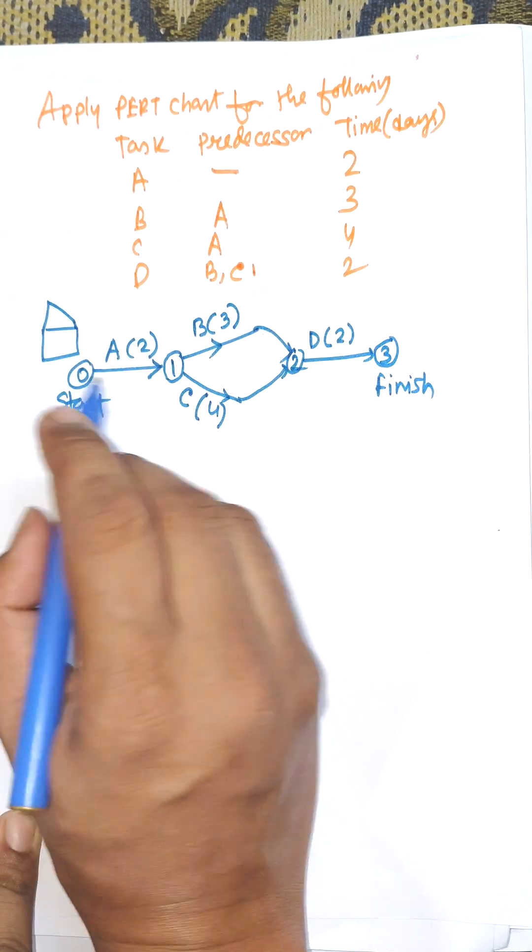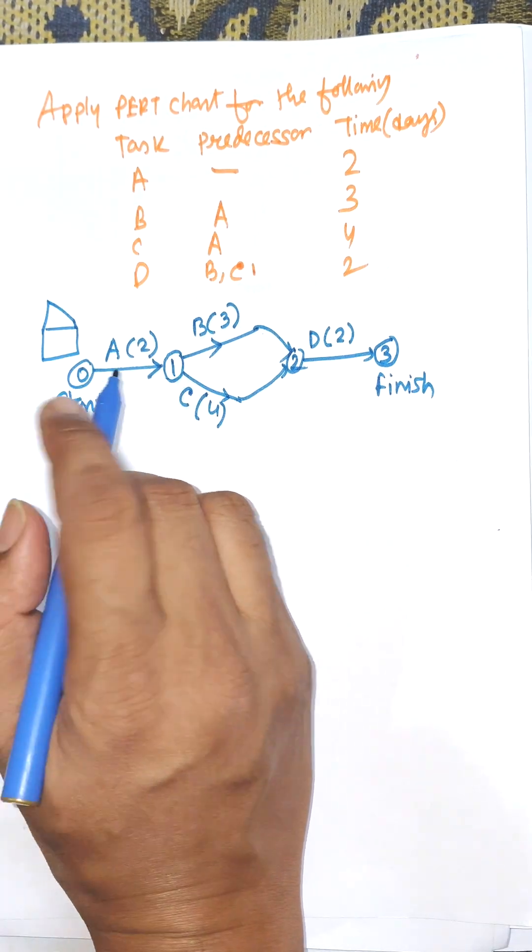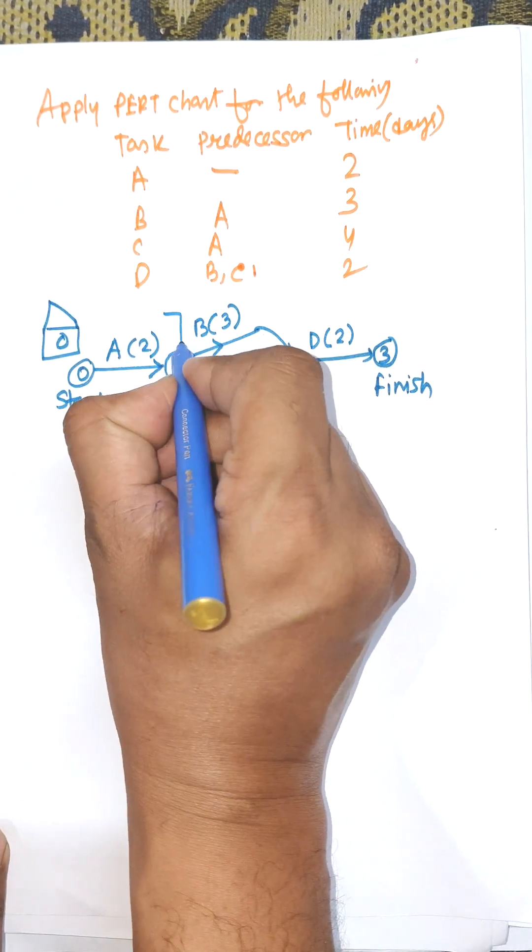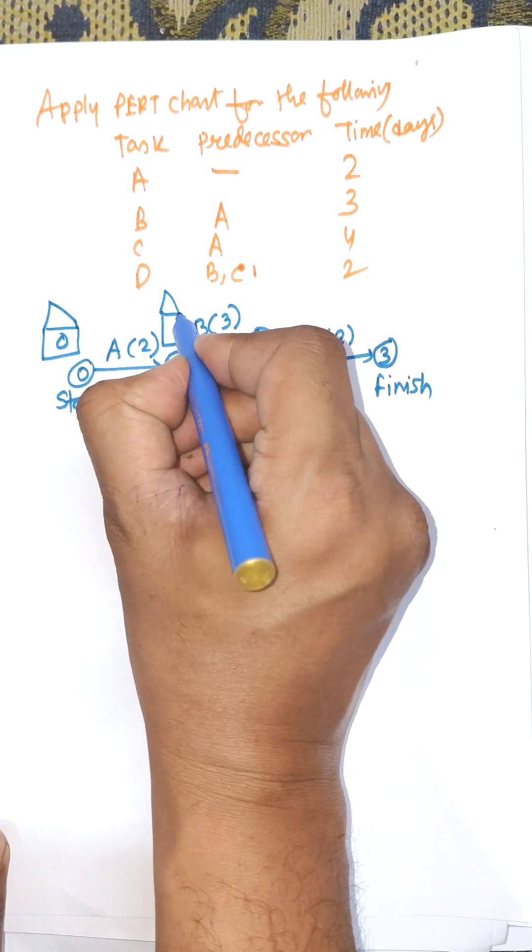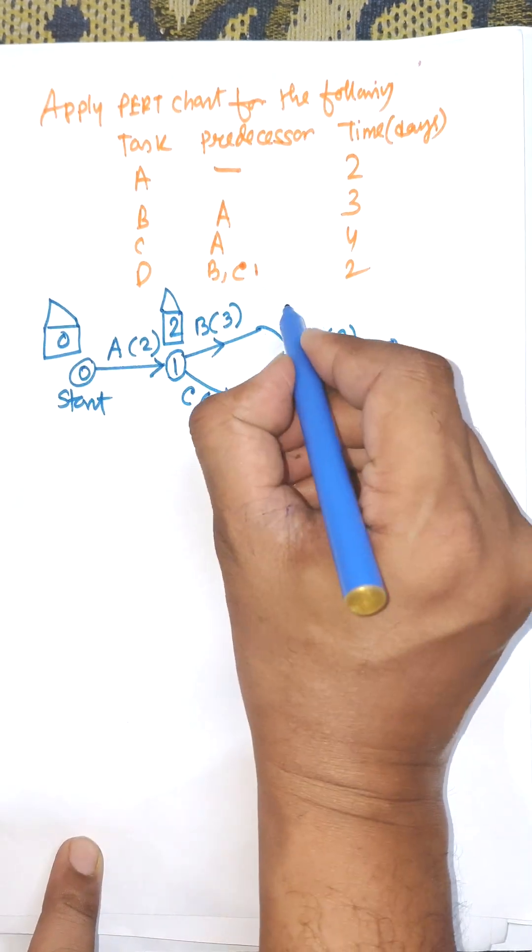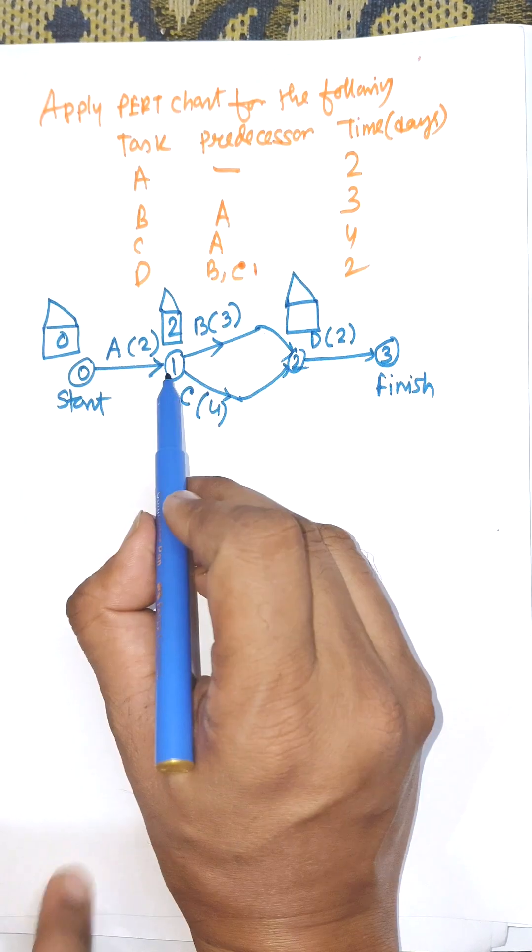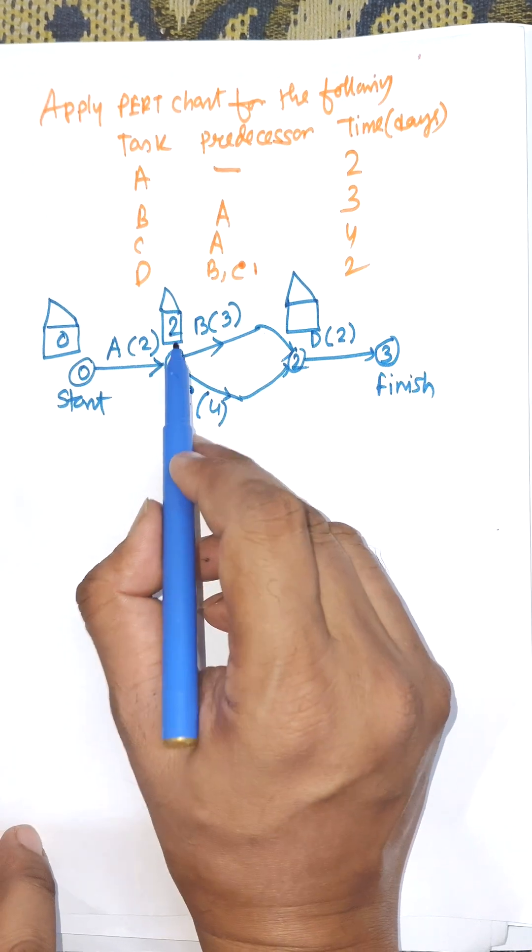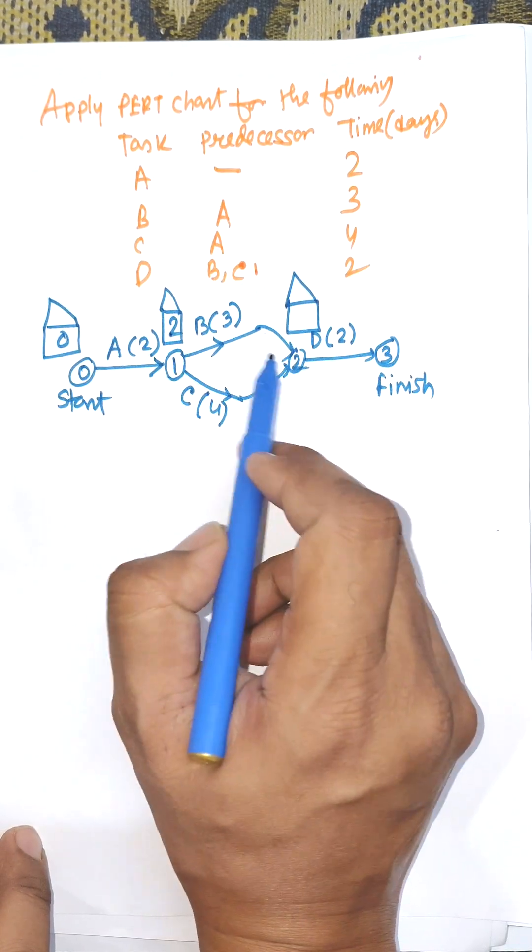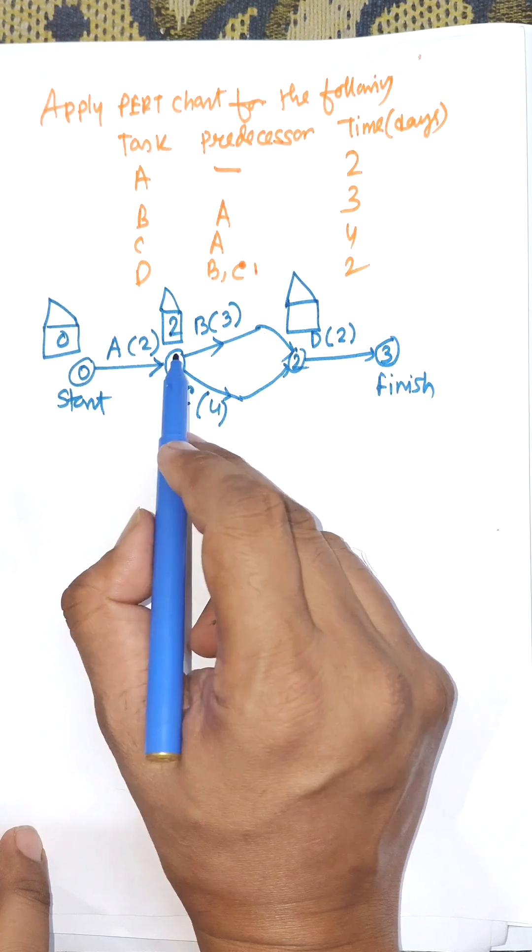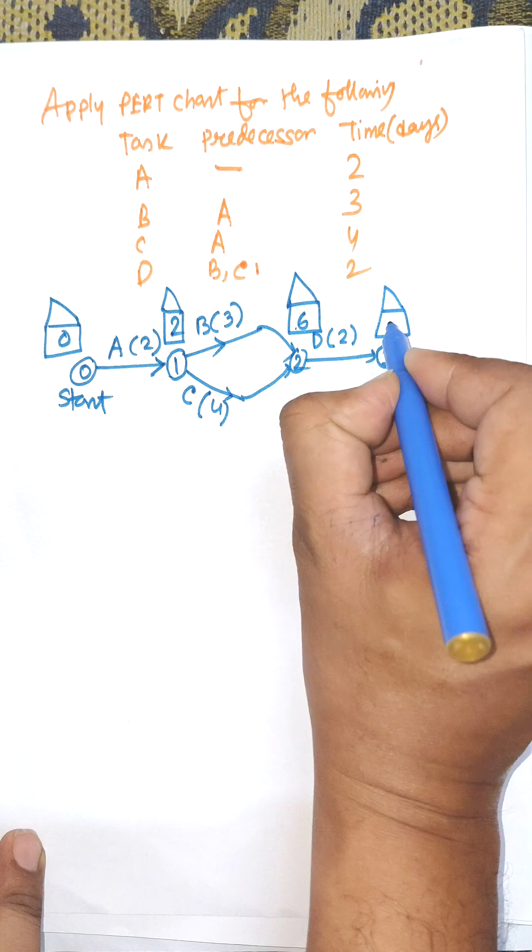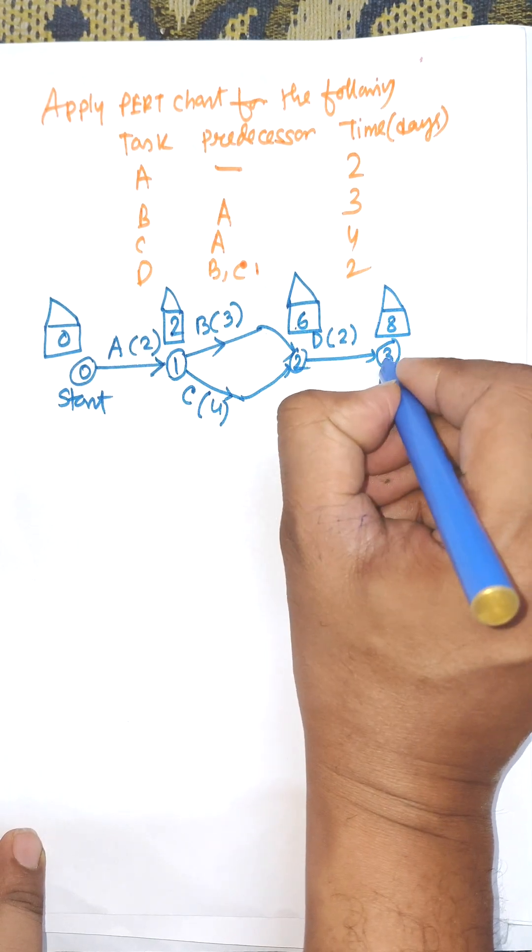We need to calculate earliest time calculation and latest time calculation. For A is 0 and for C is, for 1 is 0 plus 2 is 2. Here for the earliest time for the node 2 is, here 2 plus 3 equal to 5 and 2 plus 4 equal to 6. Maximum of them, 2 plus 3 is 5 and maximum of 2 plus 4 is 6, so it is 6. Now 6 plus 2 is 8 and this is the finish state.